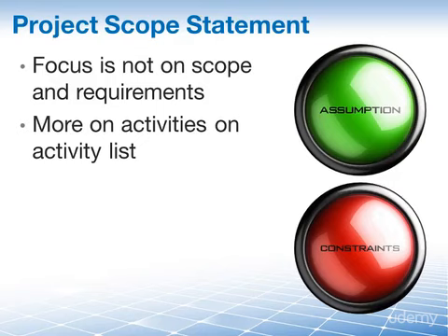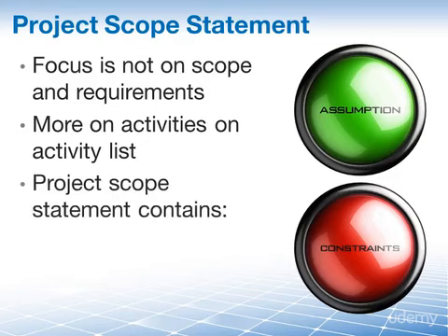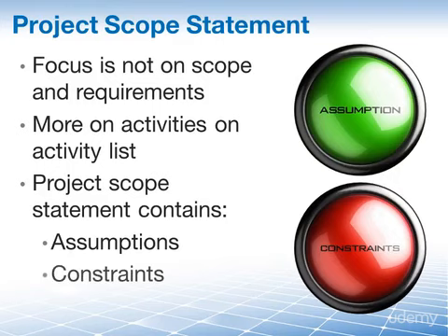Well, the project scope statement will tell us the overall assumptions. For example, assumptions about reporting periods or existing conditions that affect duration estimates. Or we also have constraints about the project in our scope statement. One constraint could be that the maximum work time per day is 7 hours and not 8 hours, or that specific equipment is not available in April. That would need to be taken into consideration.